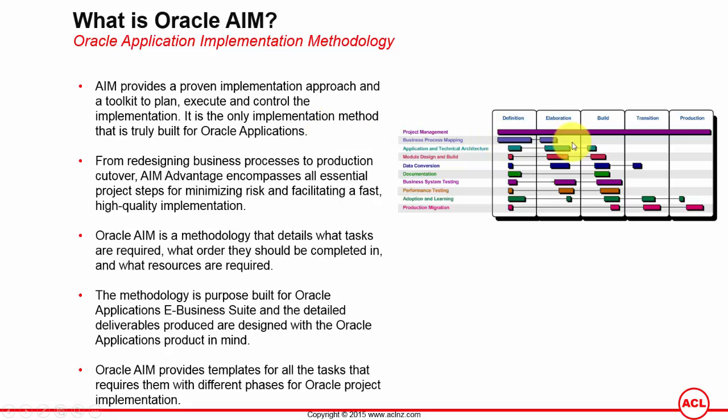On the right-hand side I have depicted a picture from the AIM method itself, which details the phases of the project and the processes listed on the left-hand side. Each of these phases will contain a number of processes. For example, the definition phase starts with project management, wherein the project manager builds a project plan and identifies team members to work with the client to start the implementation process, which could include talking to clients to understand their requirements and working out an Oracle solution, presenting it in the form of conference room pilots.